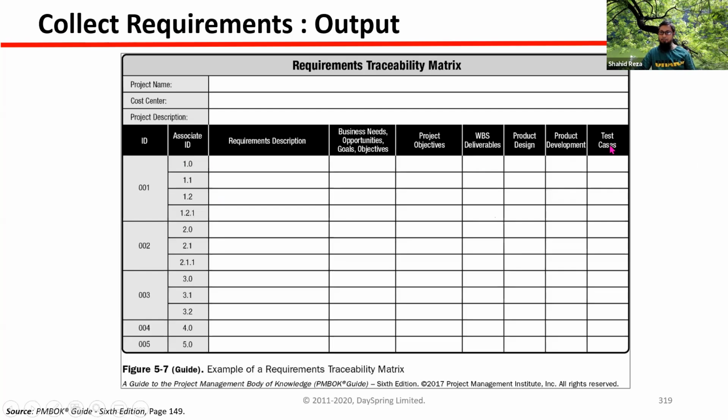So if there are 3-4 test cases related to requirement 001, after passing all these test cases, you can say that the requirement is fulfilled and the customer is going to accept it. So we are tracing all the requirements from the beginning to the end, that means delivering to the customers.